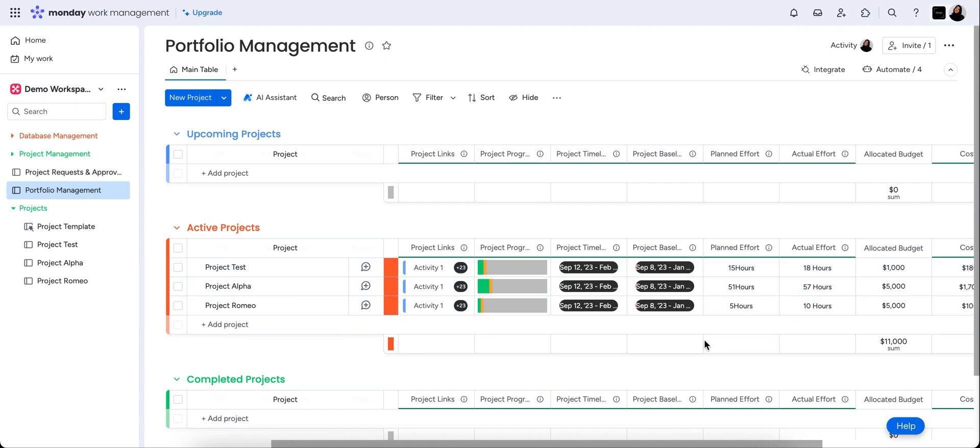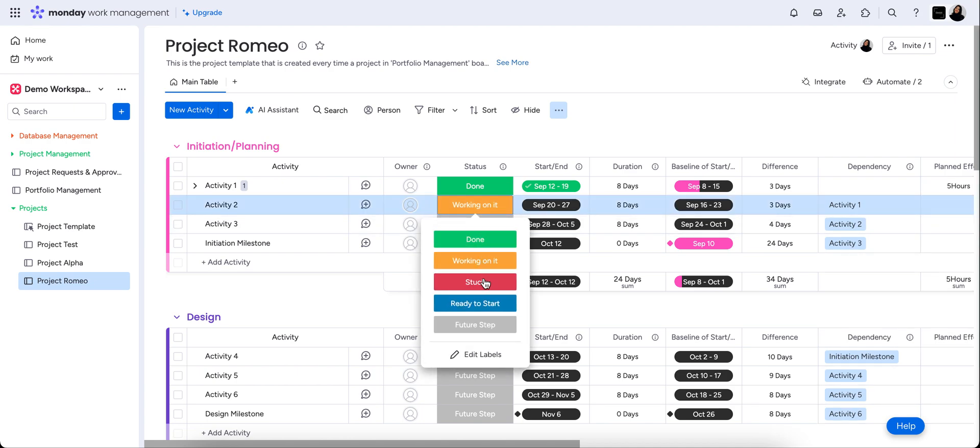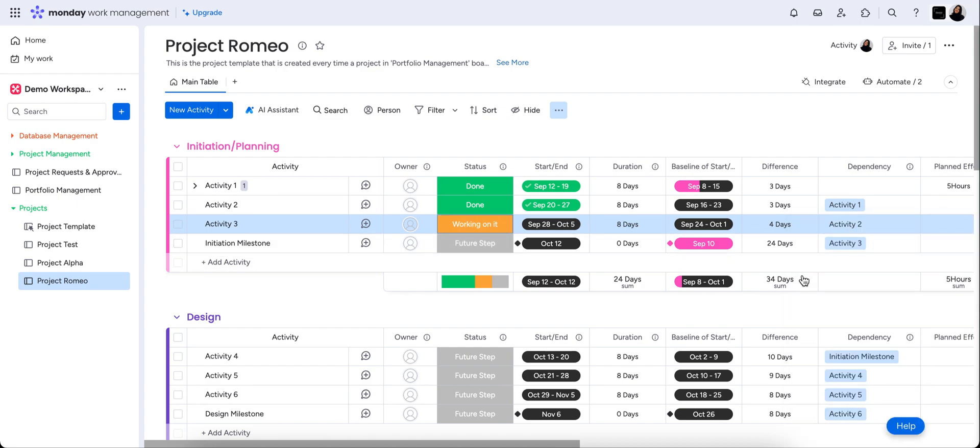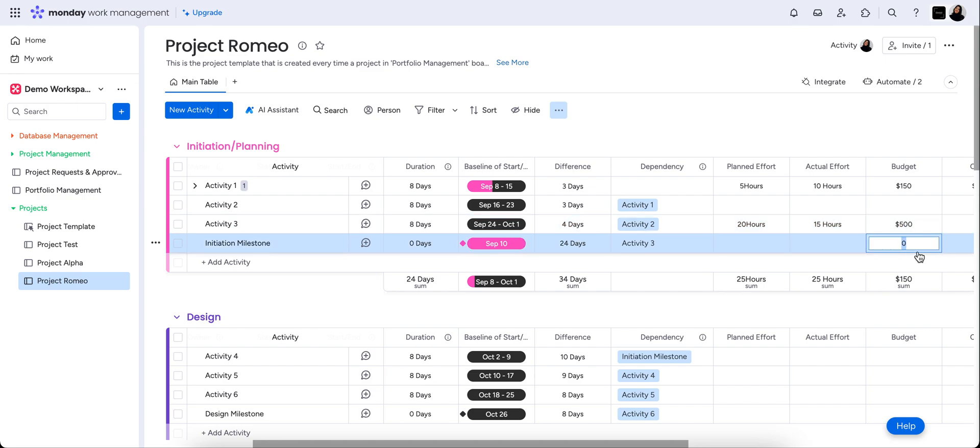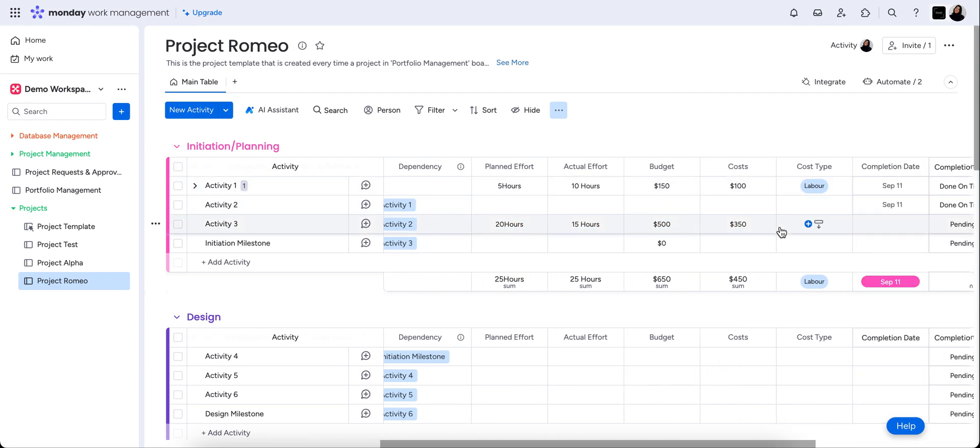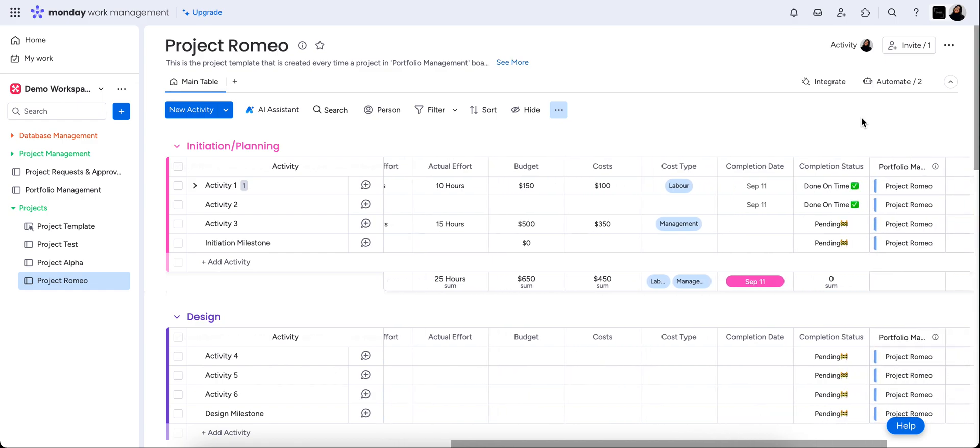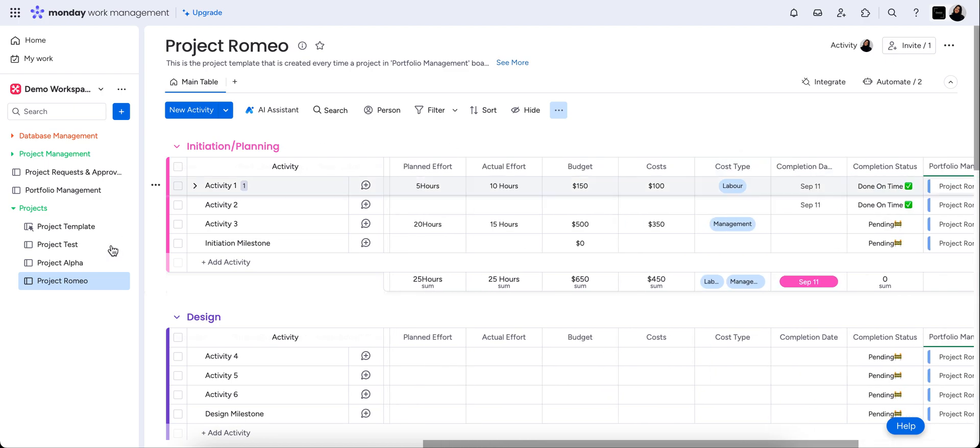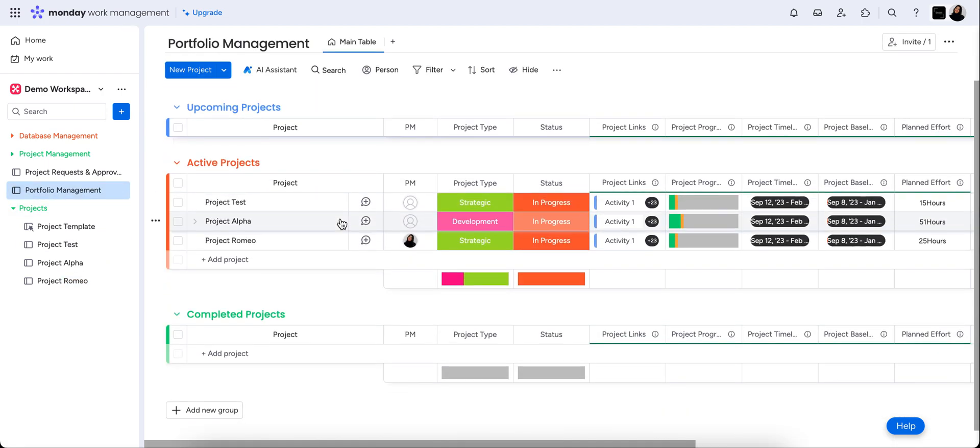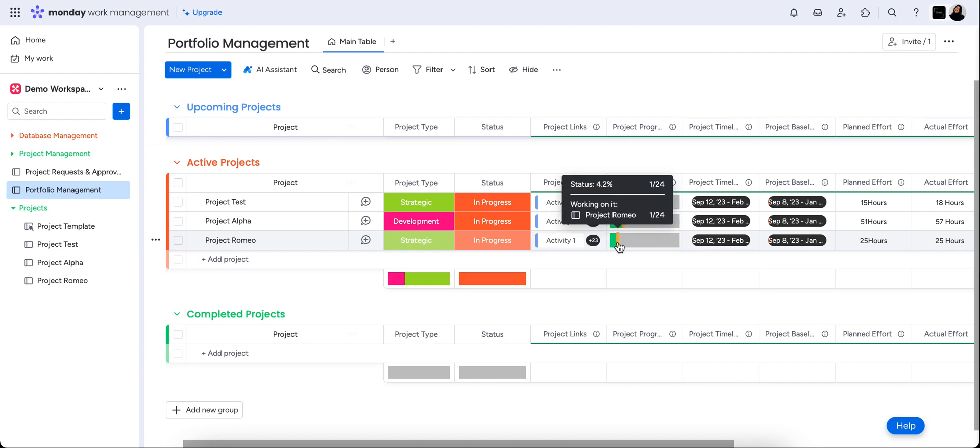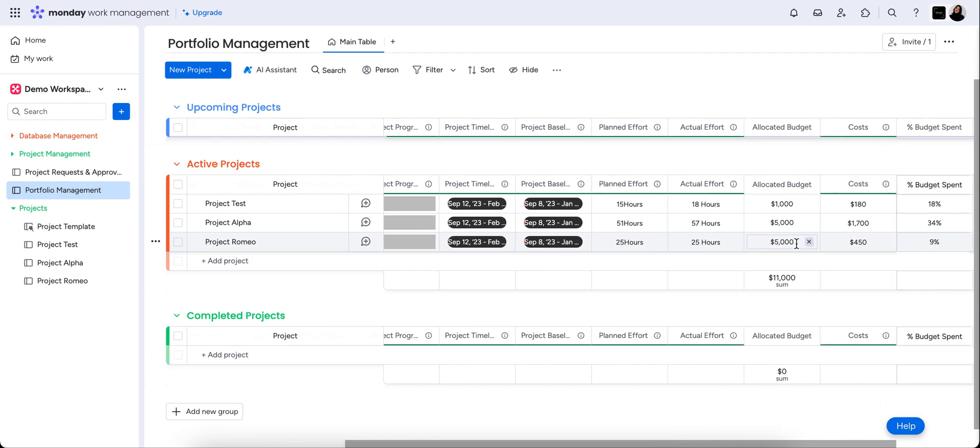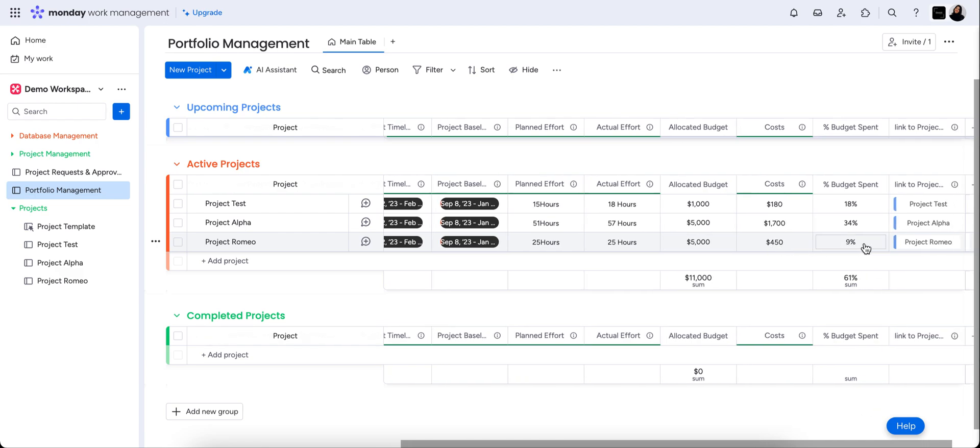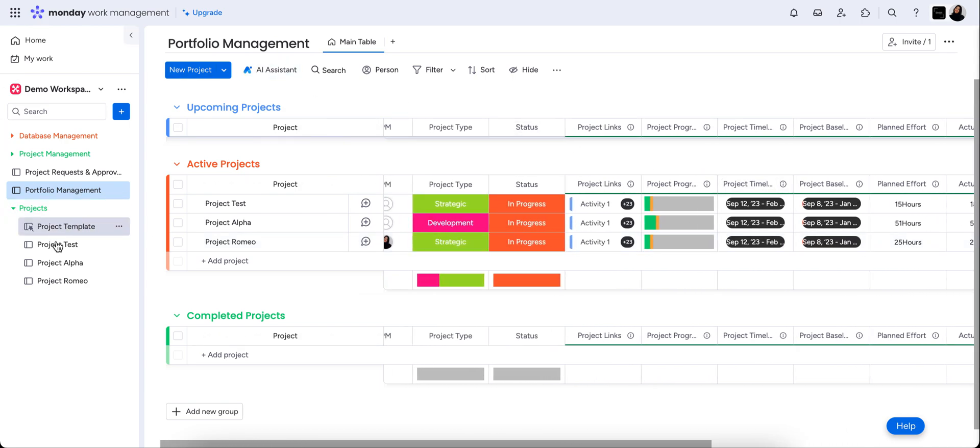So as we move through, these will all continue to change. So if we just do one more example, say this one we now consider as done and we're working on the next step. We're going to change the planned effort to 20 hours for this step. It actually took 15. The budget was $500 and we spent $350 and it was a management cost. So you can see here as well with automations just on that previous step that it's automatically popped in our completion date, our status as well. So that's just really cool on that end. Now, if we pop into the portfolio management, we'll see that this is now updated, that we've got two statuses as done, one status as working on it. It's updated our overall effort, our planned and actual effort. Our budget is still in there as normal. It's updated our costs and the percentage of the budget spent. So this will all continue to update in real time as we work through those projects.